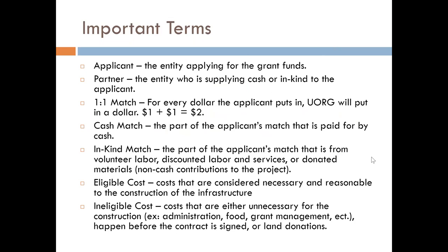In-kind match is the part of the applicant's match that is from volunteer labor, discounted labor and services, or donated materials, all the non-cash contributions. Eligible costs are considered necessary and reasonable to the construction of the infrastructure, and ineligible costs are either unnecessary for the construction, happen before the contract is signed, or land donations.